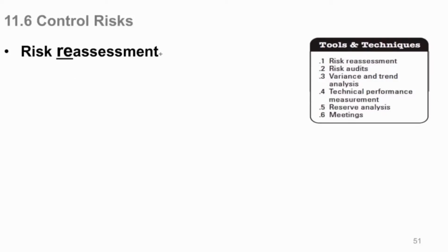You may have a simple risk that says the probability of us getting out of cost control is moderate. And your forecast will show that if this is your baseline, you have a tolerance, and if this is your baseline, you're approaching it, you may say, well, we may have to trigger our response to bring this back under control. So you can see these things coming, and that's really what you want before you have to activate a plan. You want to make corrective actions before a more severe kind of plan has to be put into place.